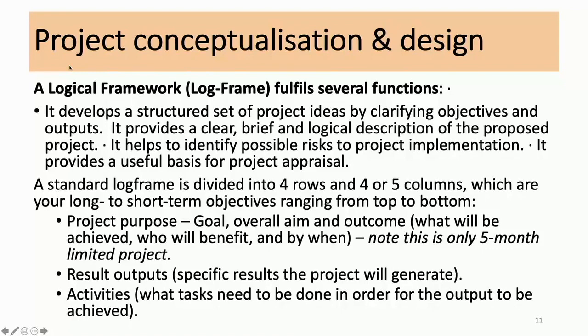A standard log frame is divided into 4 rows and 4 or 5 columns, which are your long to short-term objectives ranging from the top to the bottom. For this project, we use a very simplified log frame. But you need to start thinking to complete the simplified log frame. You still need to think on the overall, start with the project purpose, the overall aim and outcome.